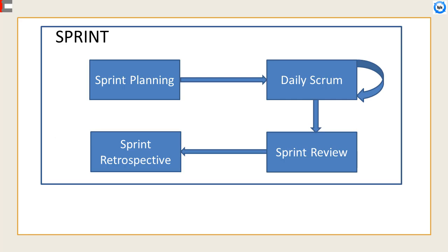Now we will cover the events in Scrum, which are the sprint itself, sprint planning, daily Scrums, the sprint review, and the sprint retrospective. All events are time-boxed events, such that every event has a maximum duration. Once a sprint begins, its duration is fixed and cannot be shortened or lengthened. The remaining events may end whenever the purpose of the event is achieved, ensuring an appropriate amount of time is spent without allowing waste in the process.